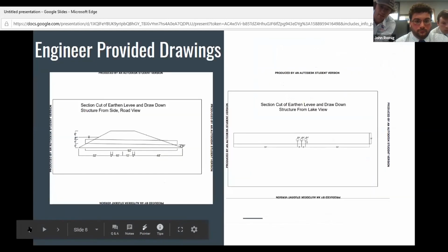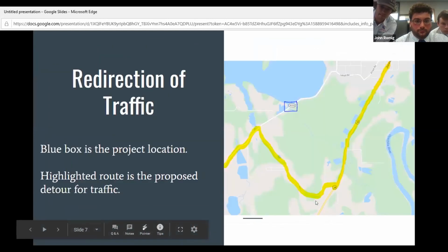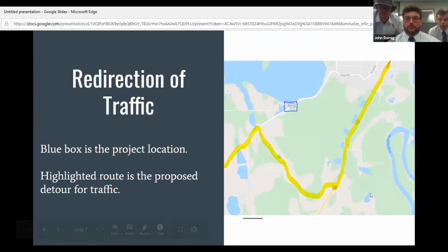We do have signage and we put that detour in our schedule. We have 2 days. Yes, we added that to our bid. We estimated for it accordingly, with a crew of our guys going out, putting up signs, and putting that detour in.